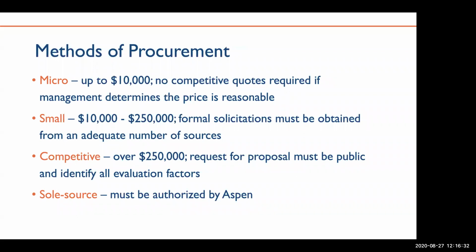And then lastly, we have the sole source method of procurement. A sole source method is defined as any contract entered without a competitive process. Some circumstances which may allow for a sole source include the item or service is only available by one source, or competitive solicitation is determined inadequate after a process is administered. Note that every sole source requires documenting market research and cost analysis efforts, to name a few, and any sole source requires Aspen Institute approval.